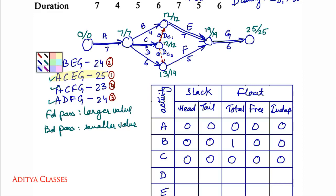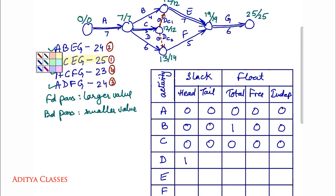For activity D: head slack is 14 minus 13 equals 1; tail slack is 7 minus 7 equals 0. Total float: 14 minus 7 minus 6 equals 1. Free float is total minus head: 1 minus 1 equals 0. Independent float is free minus tail: 0 minus 0 equals 0.